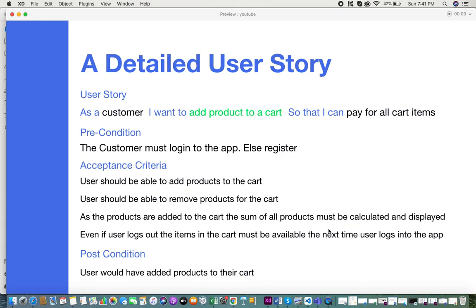The next part is acceptance criteria — in order for this user story to be complete and accepted by the user, certain criteria must be met. First: the user should be able to add products to the cart. Second: the user should be able to remove products from the cart. Third: as products are added, the sum of all products must be calculated and displayed. Fourth: even if the user logs out, the items in the cart must be available the next time the user logs into the application. These acceptance criteria must all be satisfied for the user story to be marked complete.